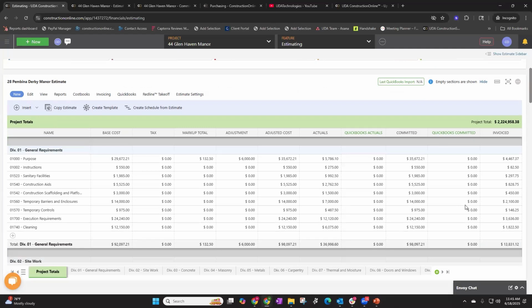When we're looking at invoices that we've received from subcontractors, like payables, ones that we need to pay, those are typically going to be entered as a bill. And like Carly mentioned earlier, those bills won't show anywhere within these columns on the estimate until a payment has been recorded. So once you record that payment for the bill, once it's been paid, that's when it's going to drop into your actuals column.